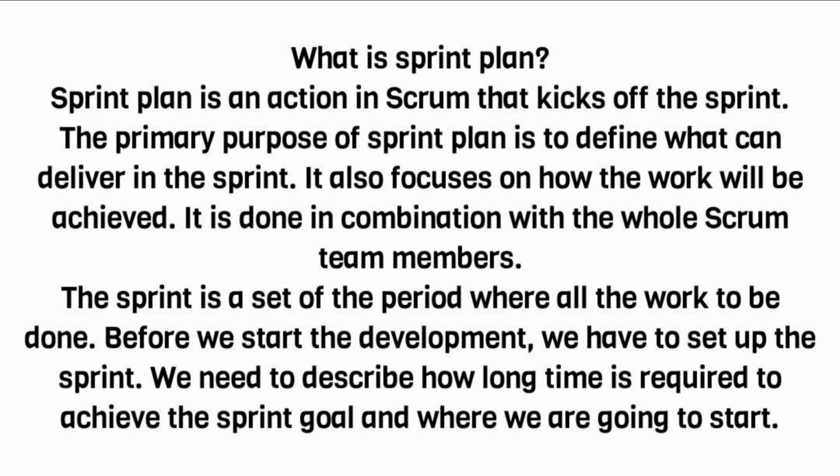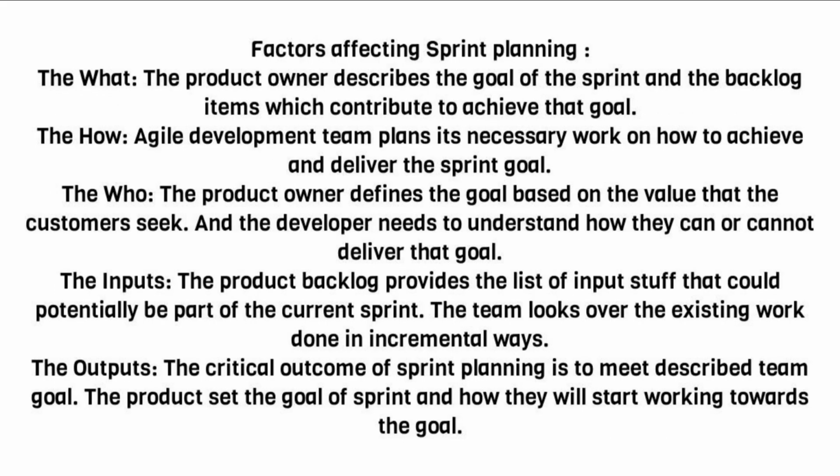Before we start the development, we have to set up the sprint. We need to describe how much time is required to achieve the sprint goal and where we are going to start. Factors affecting sprint planning. The what: the product owner describes the goal of the sprint and the backlog items which contribute to achieving that goal. The how: the Agile development team plans its necessary work on how to achieve and deliver the sprint goal.